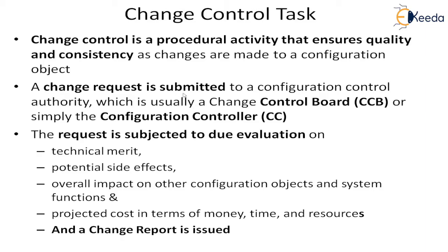A change request will be submitted to a configuration control authority, which is sometimes called a change control board or CCB or configuration controller. So either you can have one person designated as a configuration controller, or you can have a board, that means a team of senior people, who will be the authority to provide the change control permission.